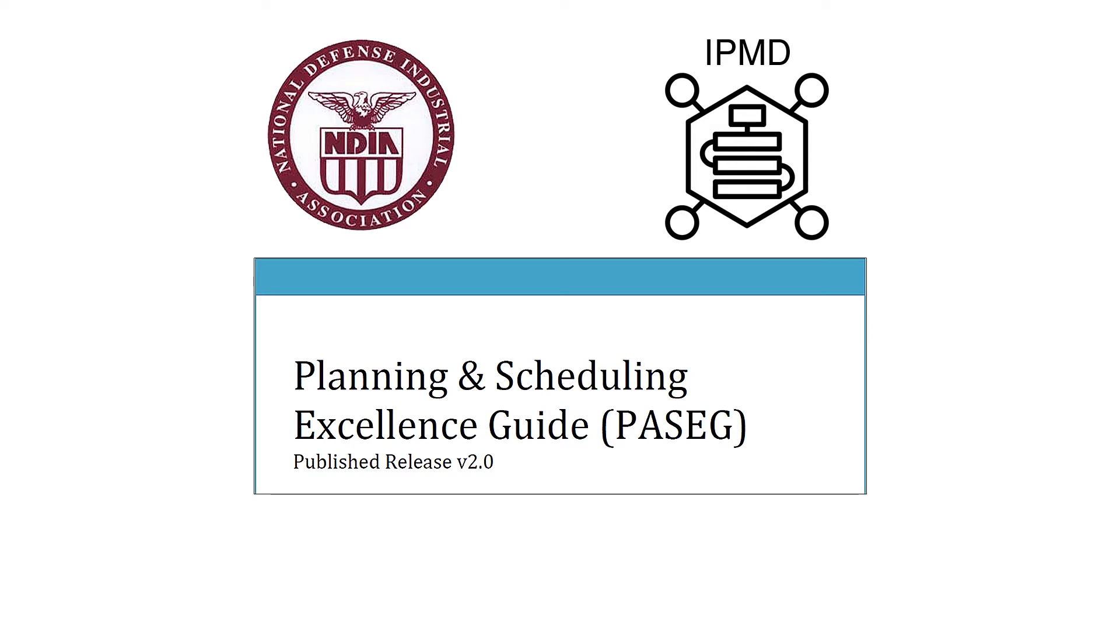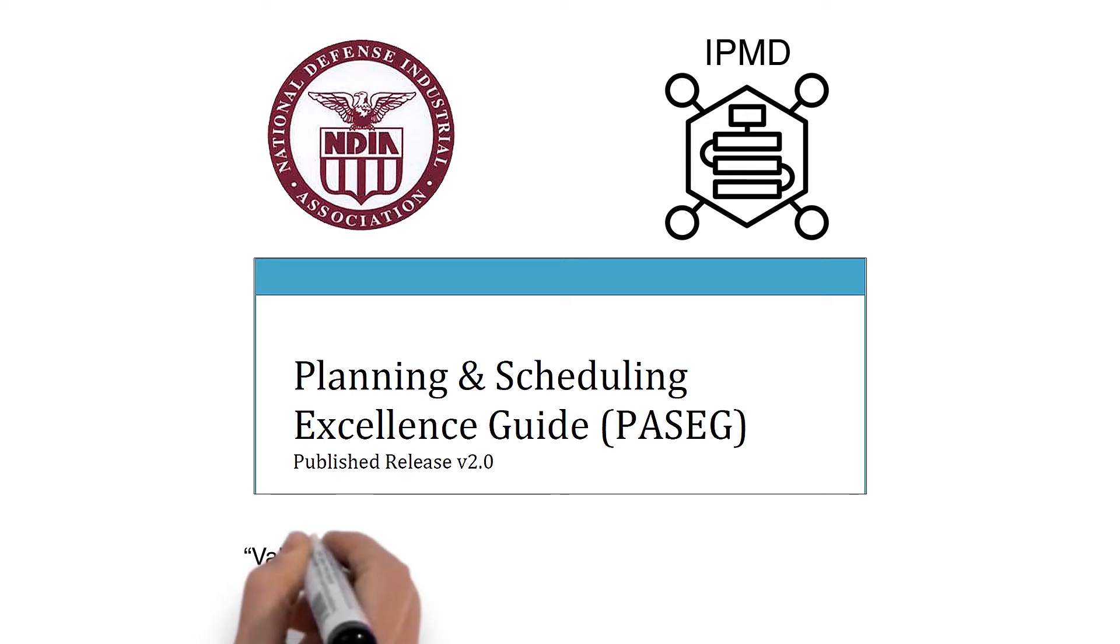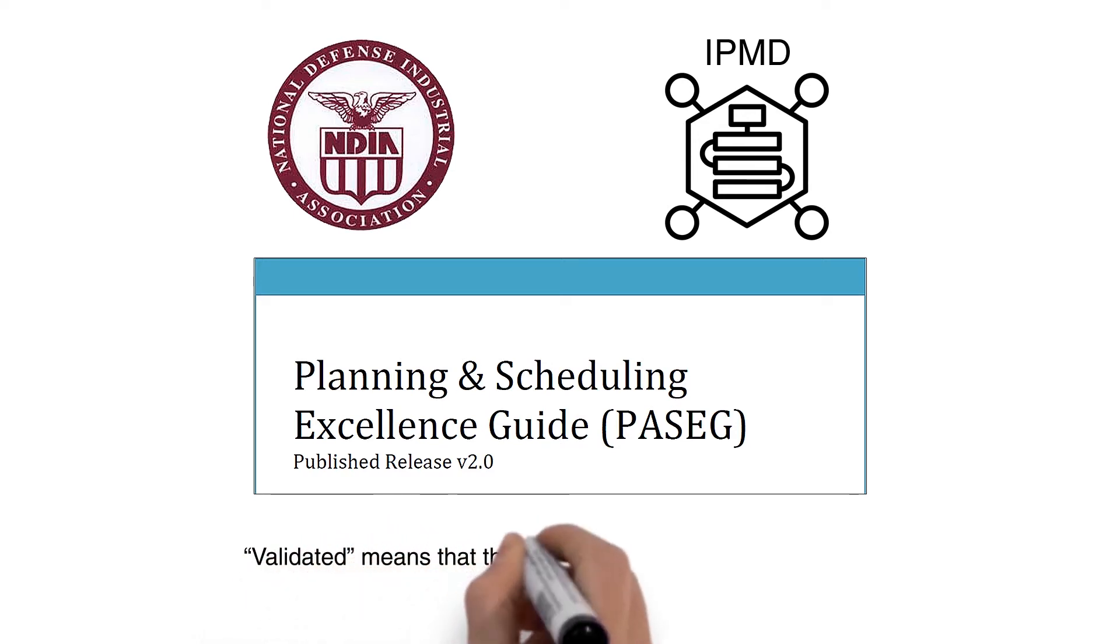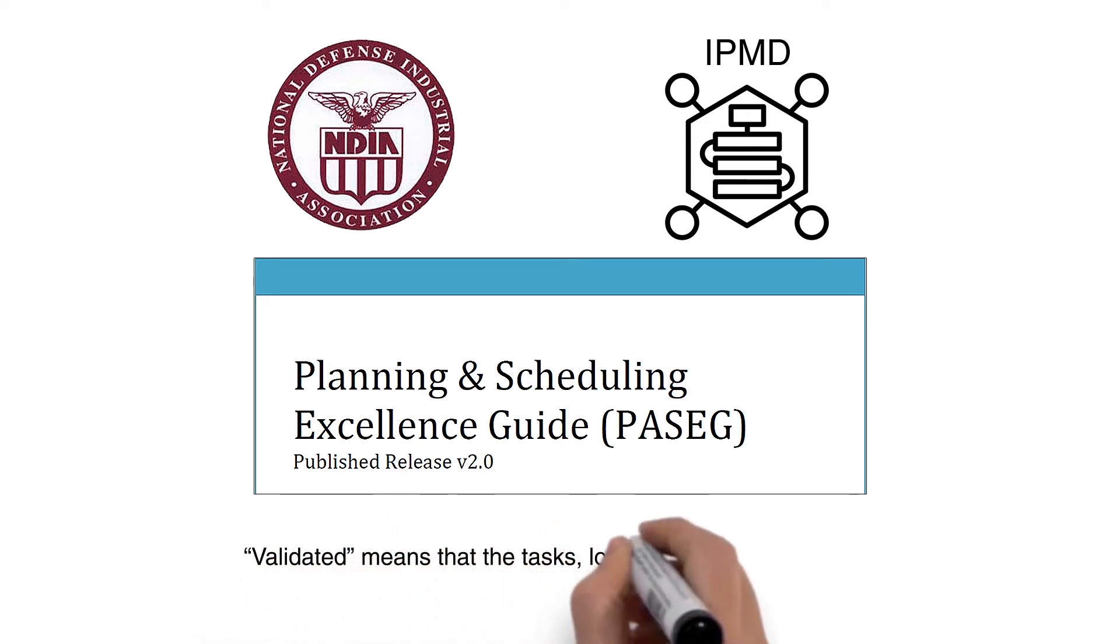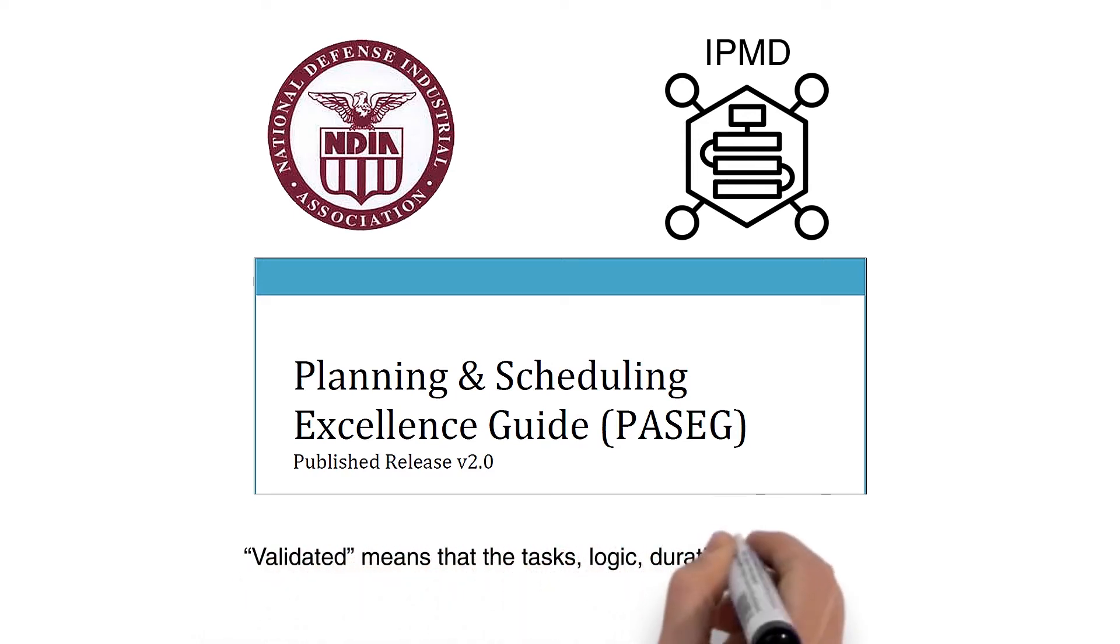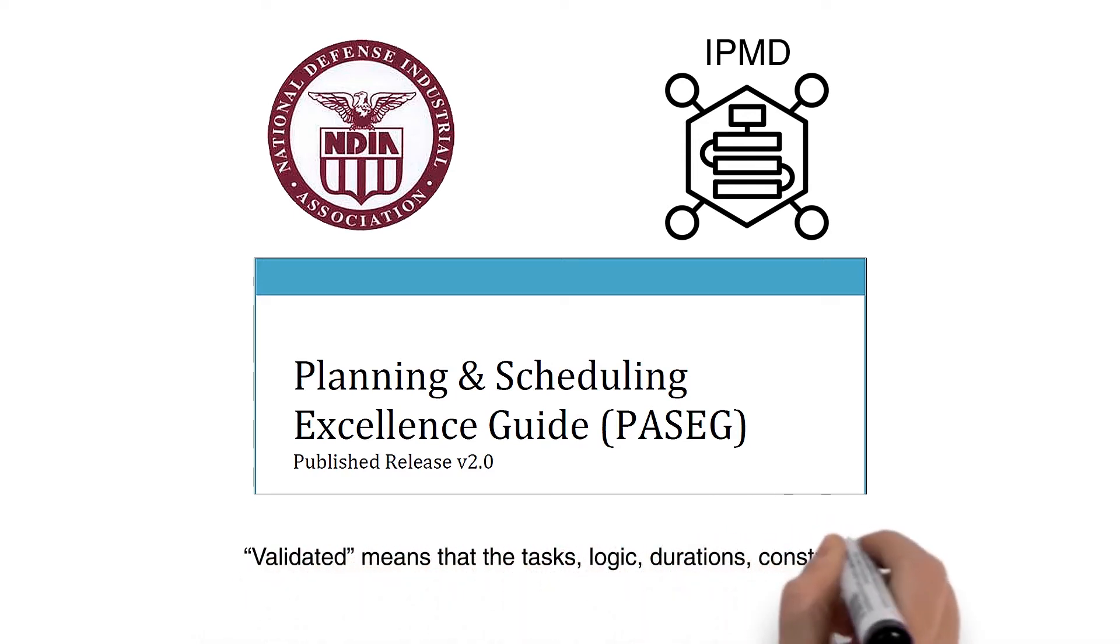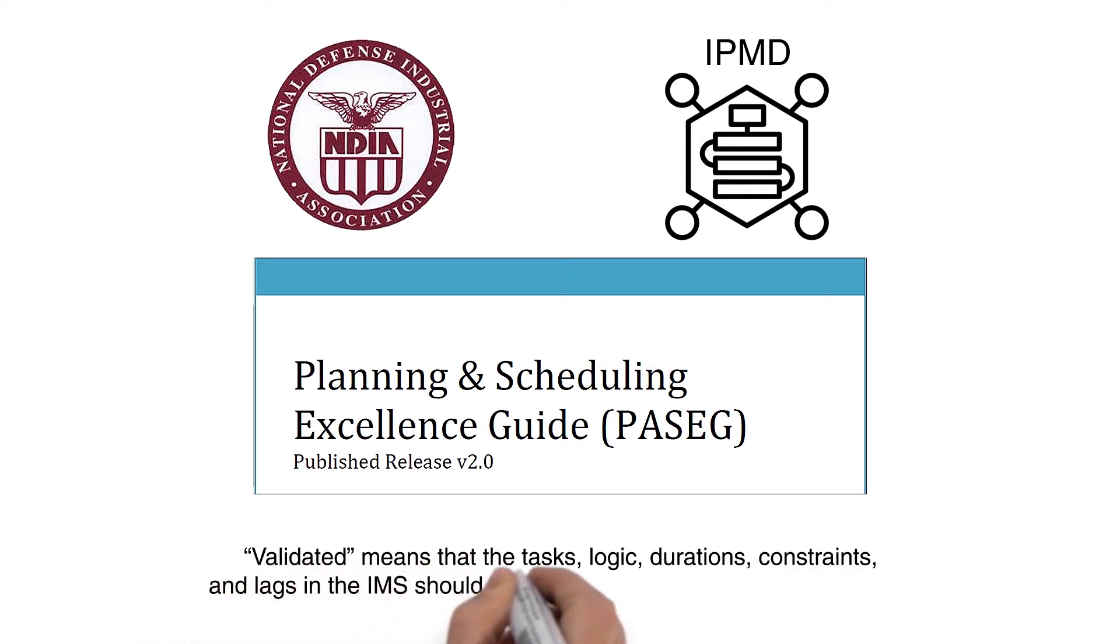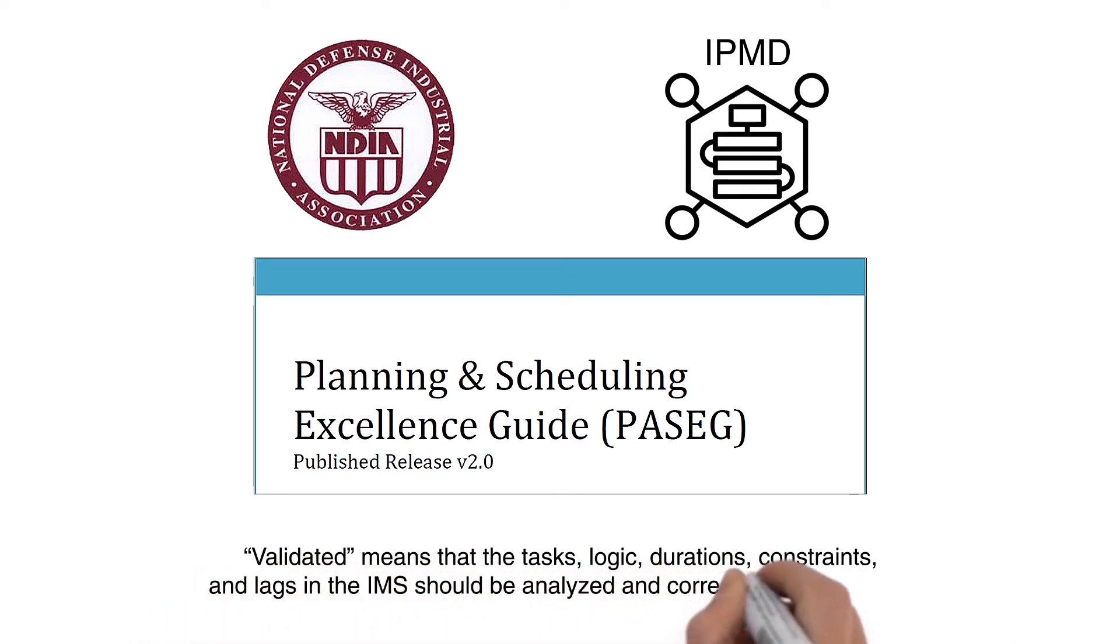One of the scheduling best practices the PASEG discusses is that the Integrated Master Schedule, IMS, should be validated before any SRA is performed. Validated means that the tasks, logic, durations, constraints, and lags in the IMS should be analyzed and corrected as necessary.